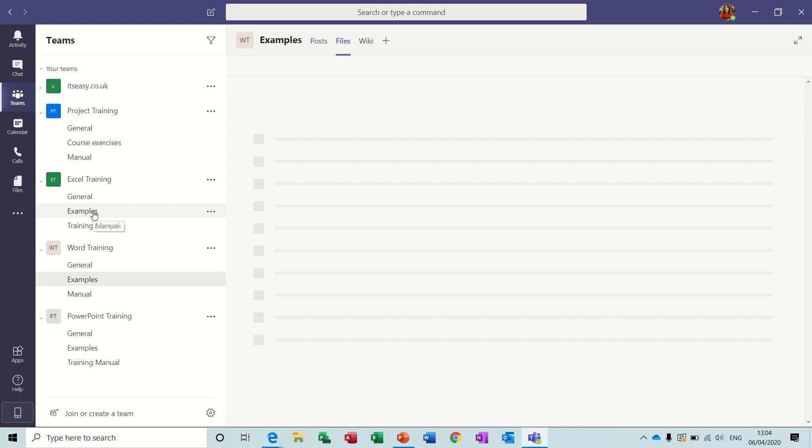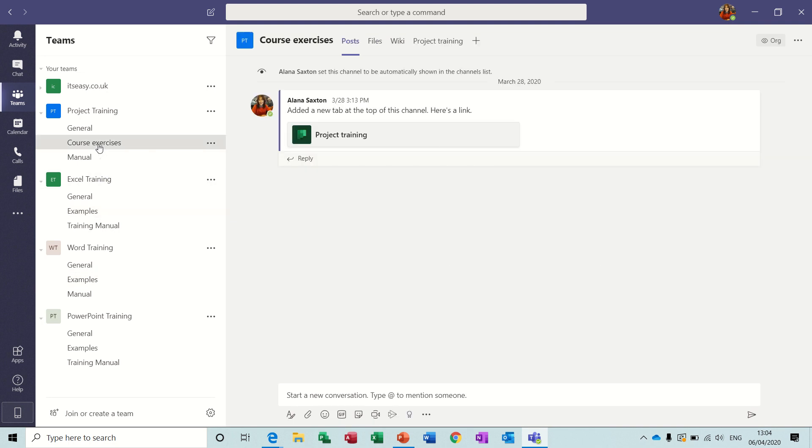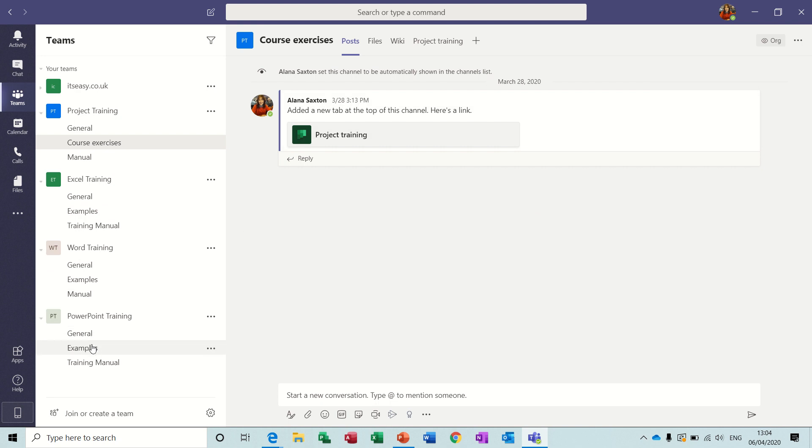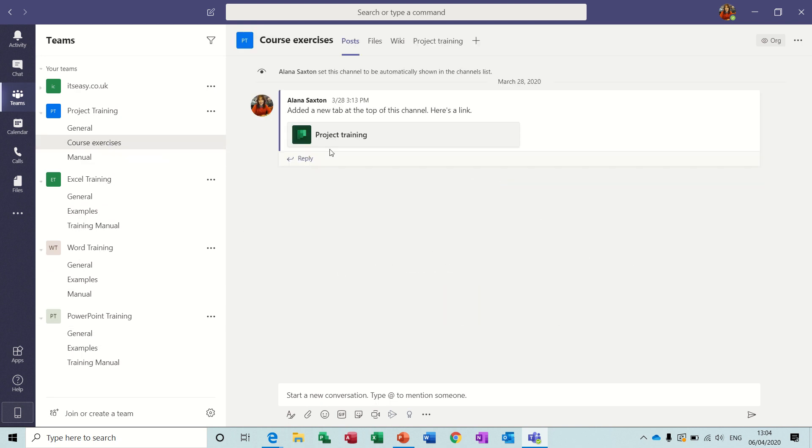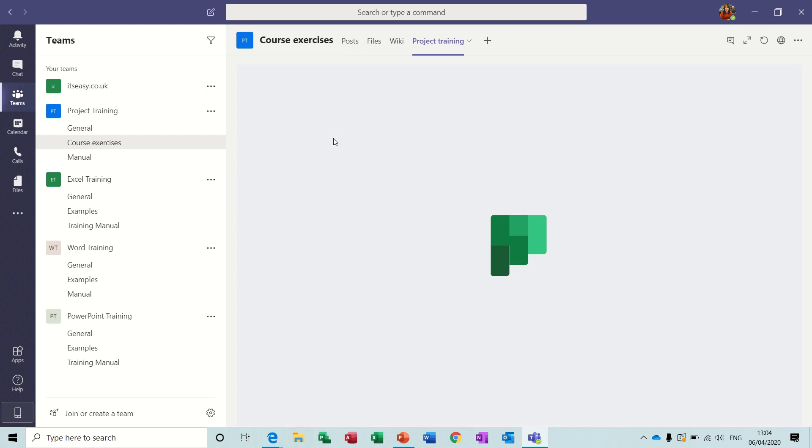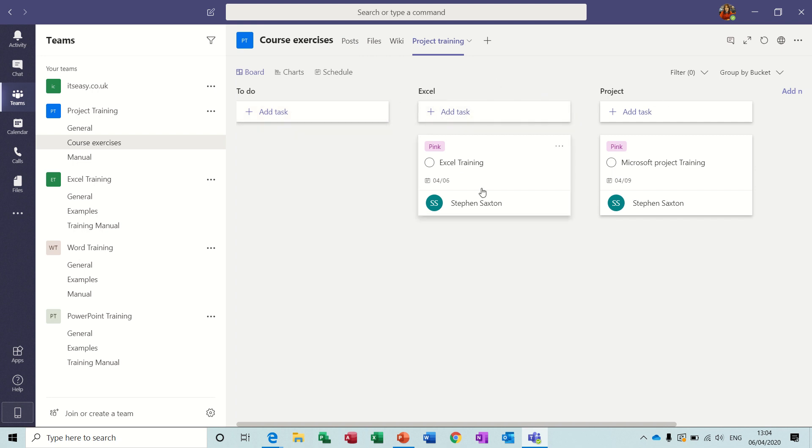Now in terms of the planner, if I go into this project one, I've actually created a project plan. So what I did was clicked on planner, it loaded planner up. So I clicked on it. This is one I've already created. So it's a very simplistic planning tool. You basically add tasks and you put them into buckets. So if you don't create a bucket, which is this last one, then add to a new bucket, you just have a big long task list.